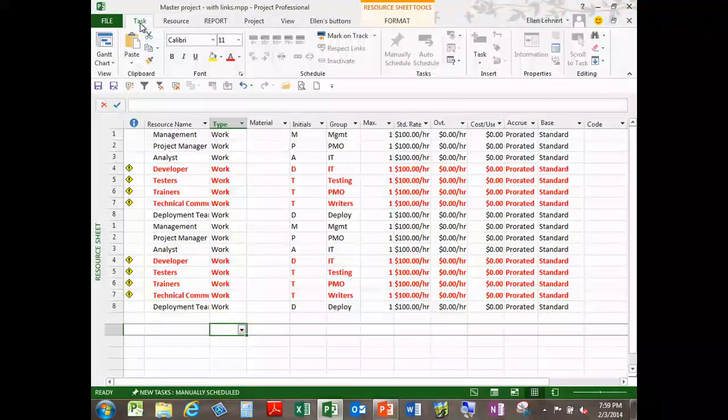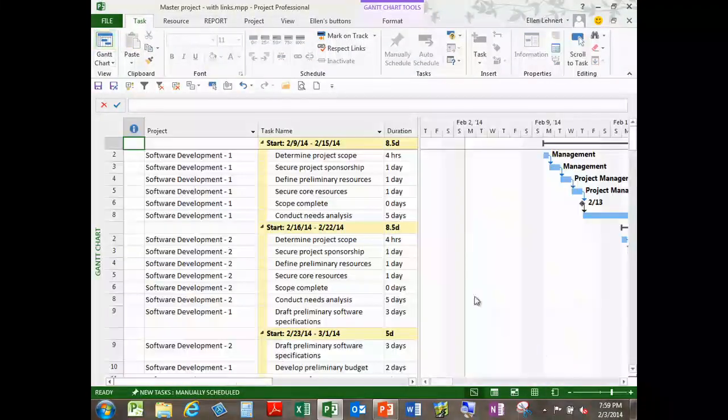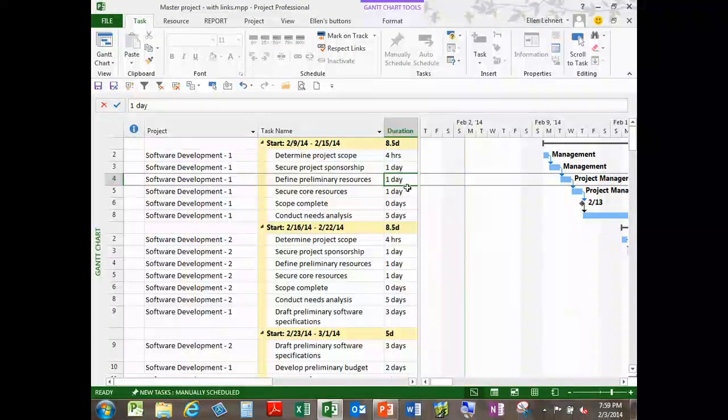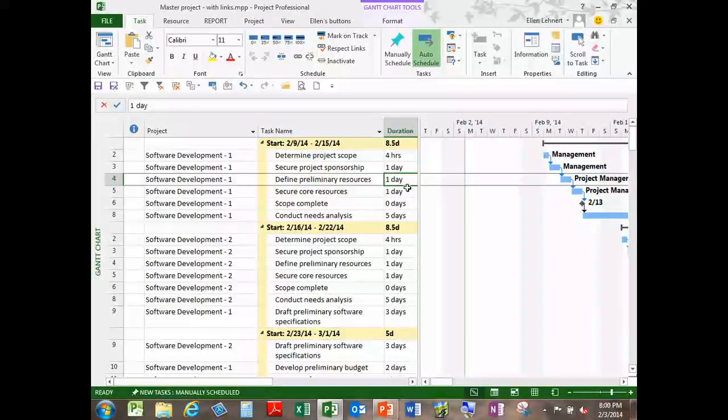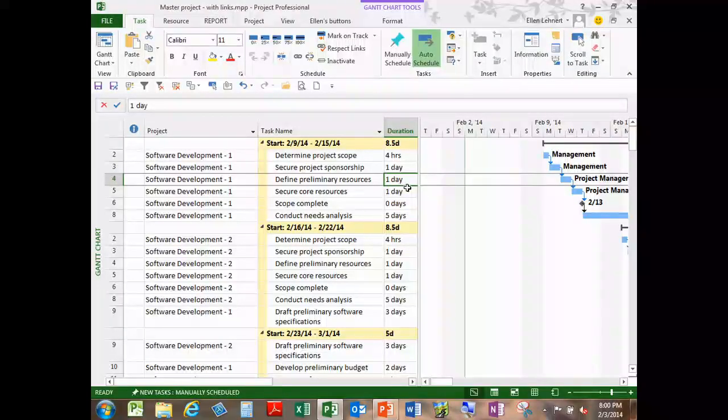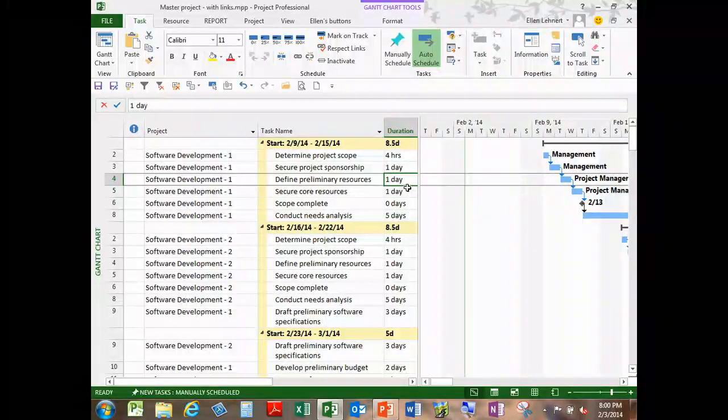But what this lets you do is if you make changes here in the master, it will update to the members. So a lot of people use this for reporting on the fly. They will use it just to put things together, just to see what's going on. And I'll tell you, if you're combining multiple projects, a lot of those other project managers are not too happy when you start changing things in their projects. Is that a popular thing to do? I don't think so. So let me show you plan B here.